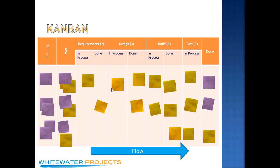This is a typical looking Kanban chart. You have the backlog of work here — you can call this your requirements backlog. You keep it prioritized and move things into the MMF column. MMF stands for minimally marketable feature, and that's what you want to be developing. Each one of these cards is hopefully an MMF, and that breaks down into several different stories that are going to make it up. The stories in Kanban are what flow — and that's different than what you do in Scrum. Kanban does not use iterations; it uses a flow.